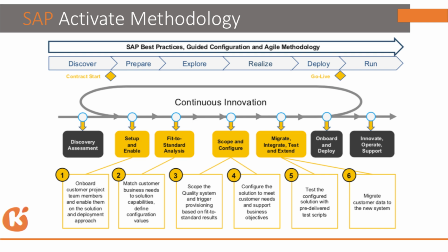Obviously when you import, the system will show that the location Hyderabad does not exist in the system. The same way, when you import salary for the employee, say basic, HRA, conveyance, CCA, whatever it is, if some of the components are not updated in the system, you will get an error that the wage type does not exist. So please have a look at that.